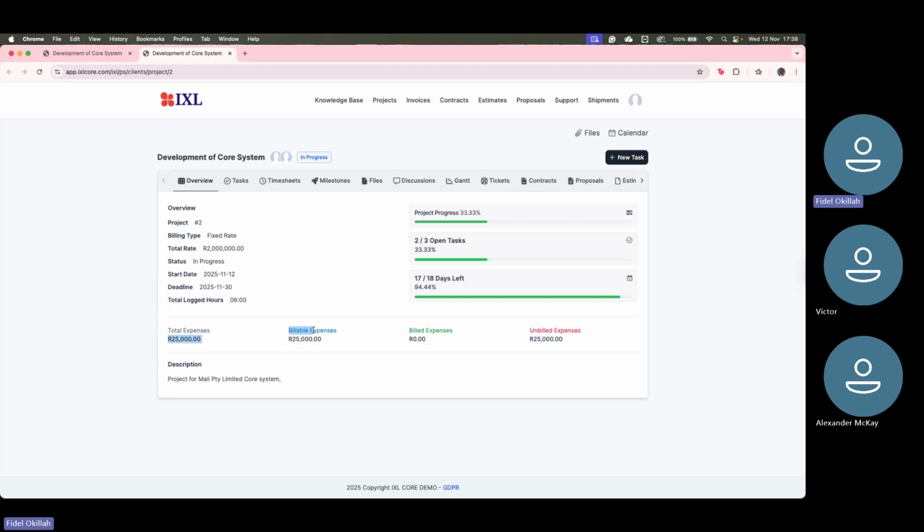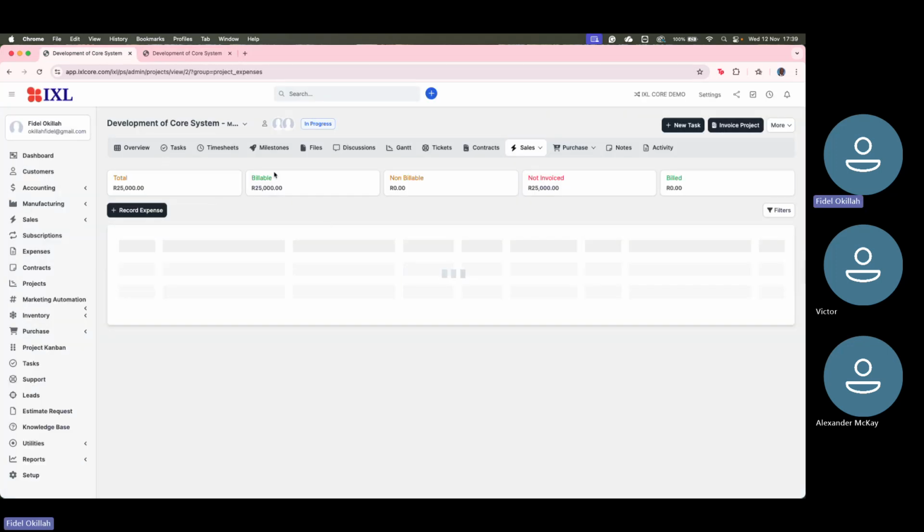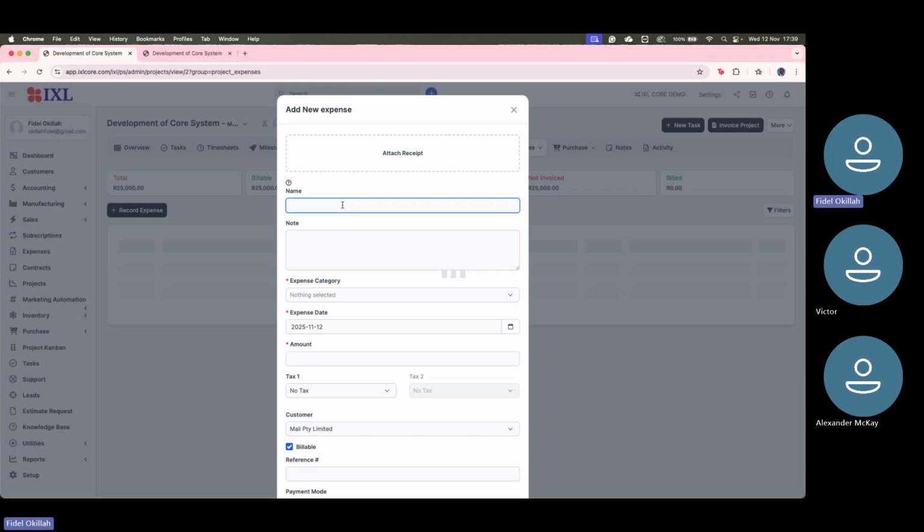So you can see from here, there is billable expenses. He's aware the total expenses so far is 25,000. So there won't be any surprises in terms of this particular project when we bill them for expenses. When we go back again, that is billable. There is unbillable. We can create again a different expense for purposes of creating expenses within our module, but these expenses probably would not fall under any, the client would not be billed for that. So I can talk of accommodation.